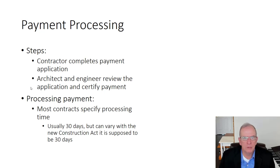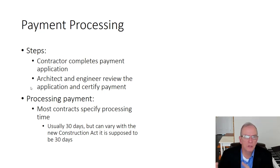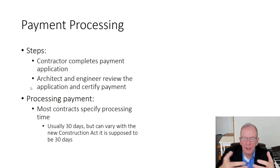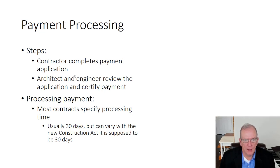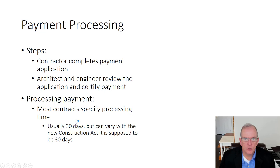On more complex projects, the owner will hire a quantity surveyor to certify that the work you're claiming is done is actually done and the values are correct. If the client is borrowing money from a bank, the financial institution will also want to certify work has been performed before releasing funds — they don't want to give money to a client and find out it wasn't done. Payment is usually around 30 days. Ontario recently changed this with what they call the Construction Act, trying to ensure payments are made within 30 days.